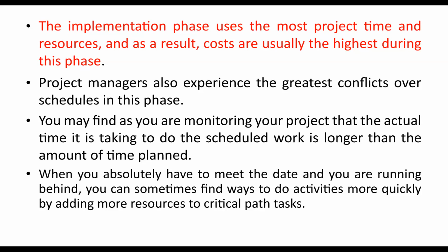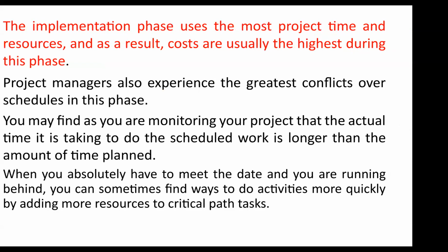You may find as you are monitoring your project that the actual time it is taking to do the scheduled work is longer than the amount of time planned. When you absolutely have to meet the date and you are running behind, you can sometimes find ways to do activities more quickly by adding more resources to the critical path.